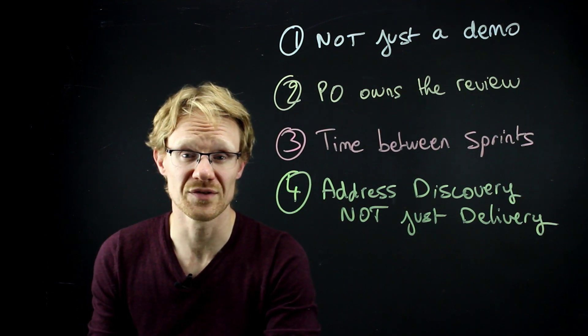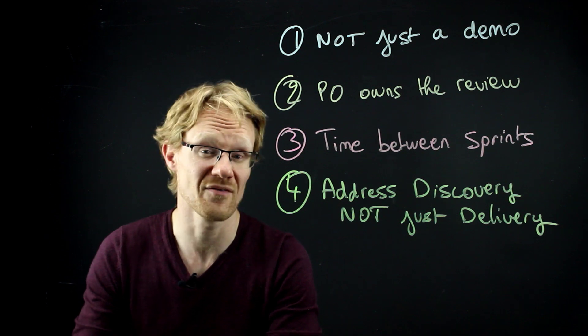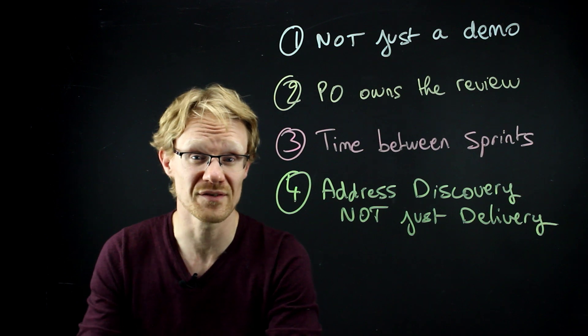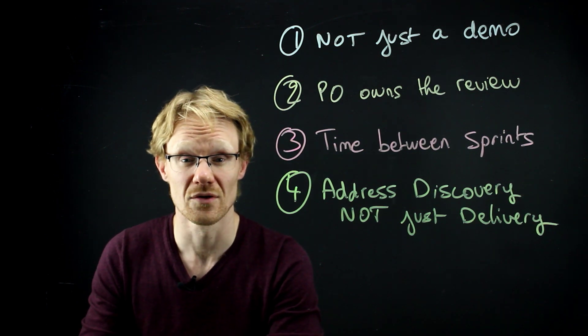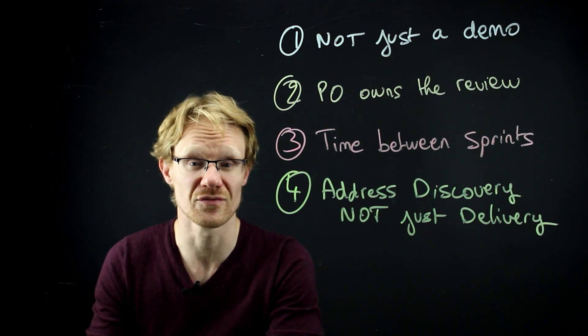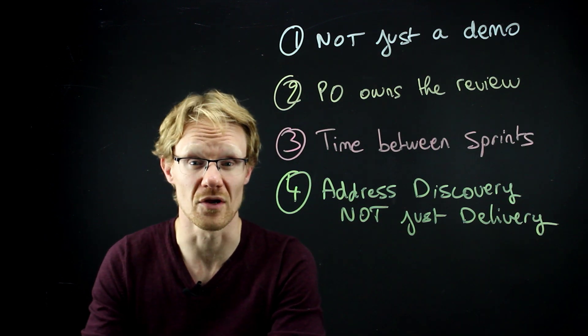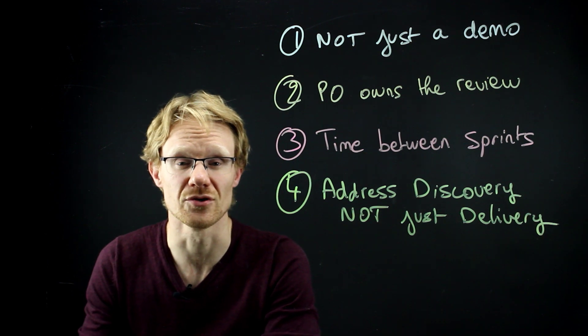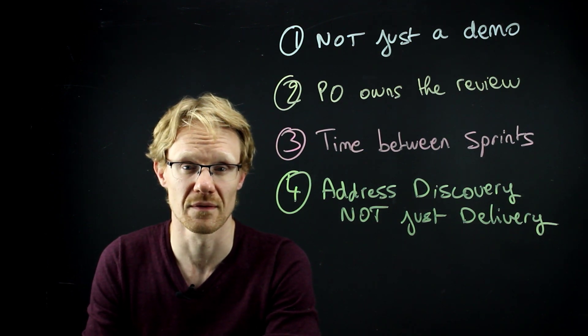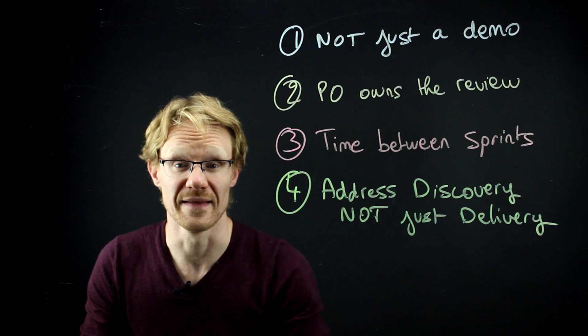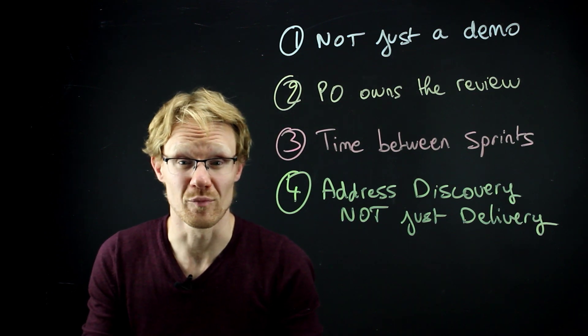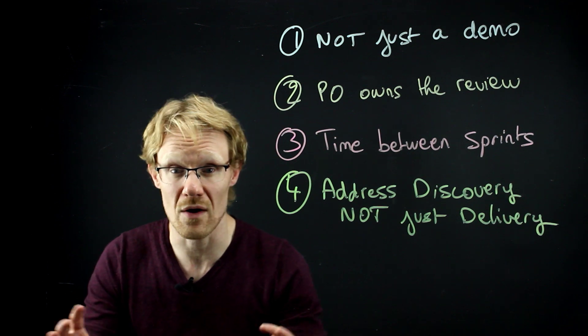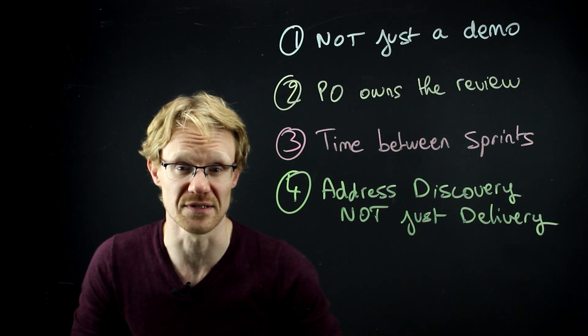So what does that mean for the sprint review and getting feedback? Well, people always talk about what they've implemented, what they haven't implemented, what they'll implement next. But they never talk about the discovery work. So do that at the sprint review. Show the things you've tried, show the things you've learned, show the experiments you've been running. Show what you've tried and learned and show the results of that. And show what you'll try next. If your stakeholders are kind of product people who like to innovate and try new things and wow their users, they'll love hearing about discovery activities.